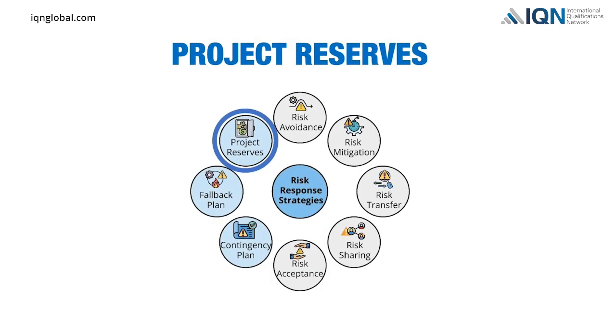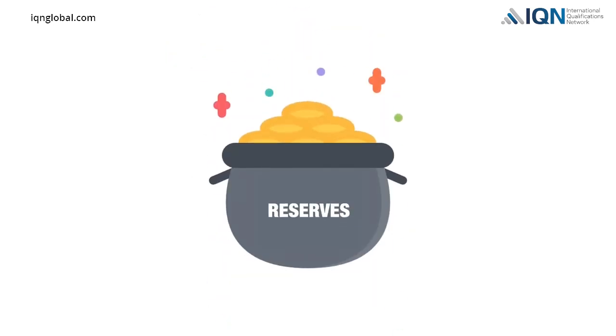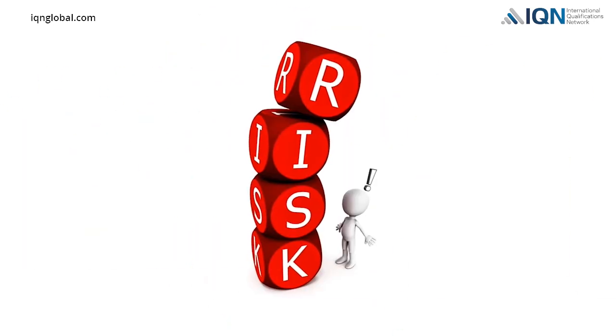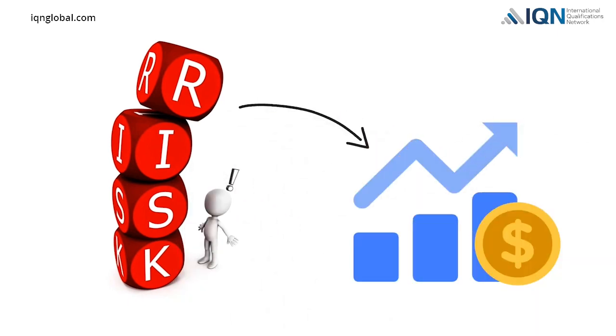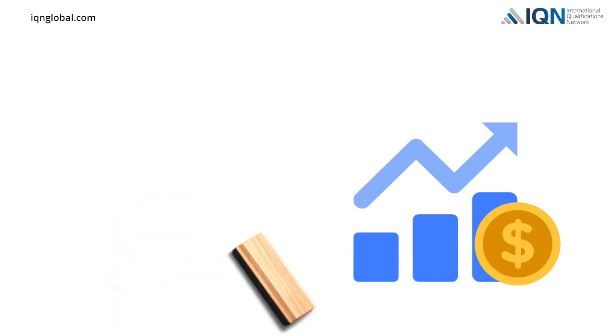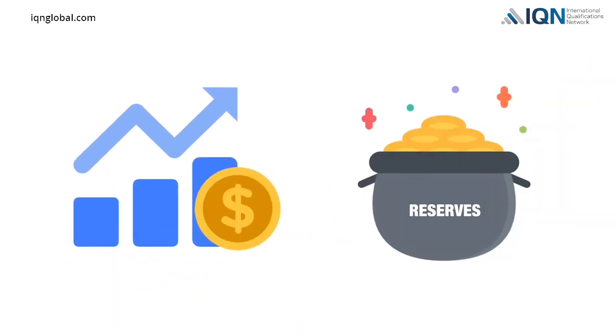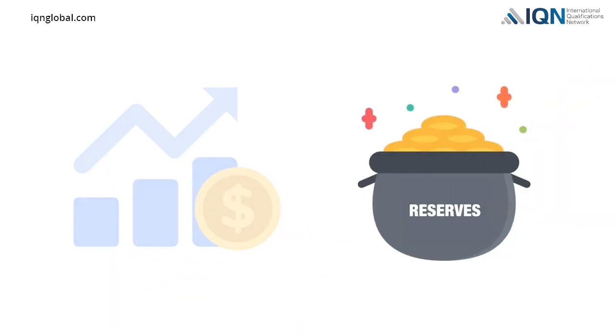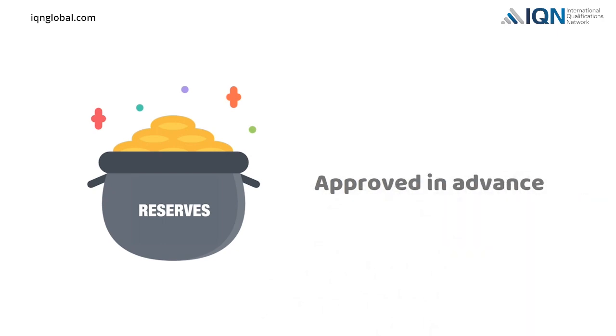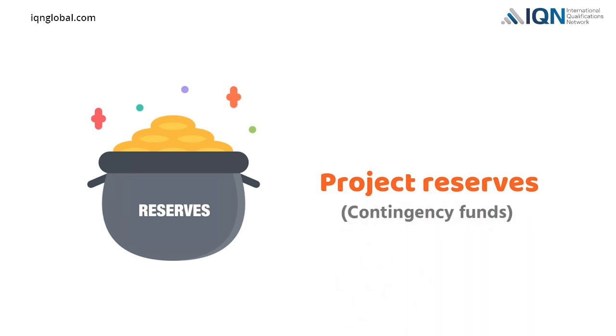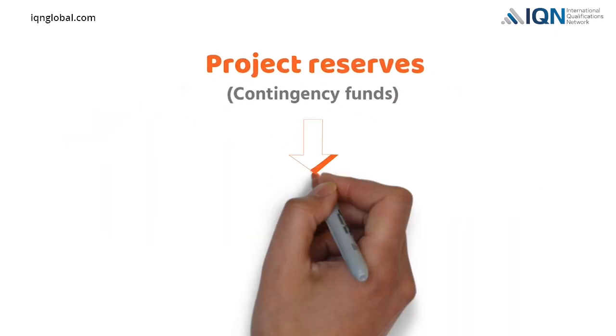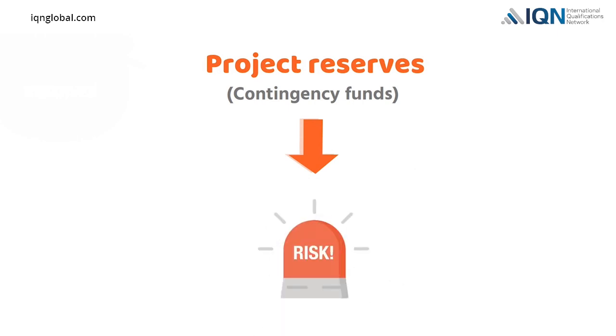Project reserves. Many projects will have project reserves. Because major risks, if they occur, lead to increased costs for the project. To deal with such circumstances, the team will need project reserves. Typically, project reserves are approved in advance by the parent organization or the client. Project reserves, sometimes called contingency funds, are special provisions for responding to any risk event.